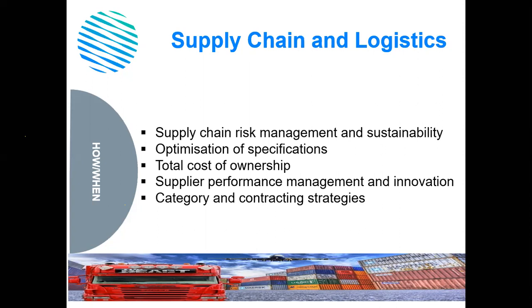So, for example, if we find that we're spending a lot of money on various aspects of IT, it might be better to treat that as a separate category and take a strategic approach to the IT spend, and perhaps rationalize the number of suppliers, or maybe give it all over to a one-stop shop organization. But in any event, whatever you decide to do, take a more strategic view for some of the bigger and more complex projects where category management is important.